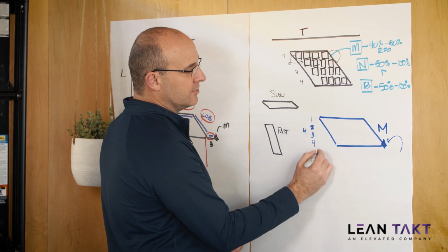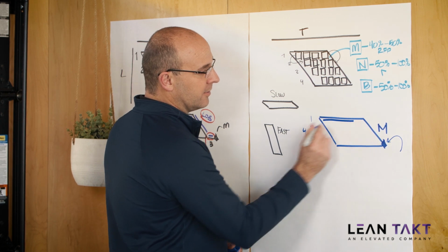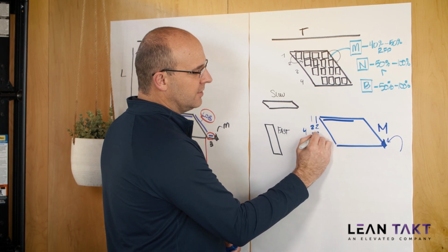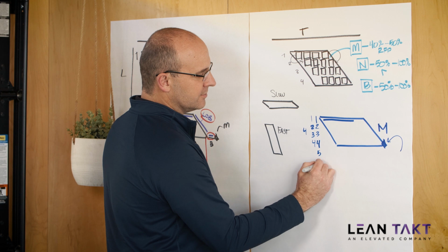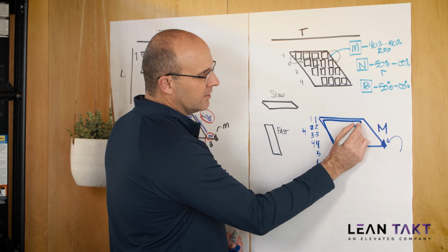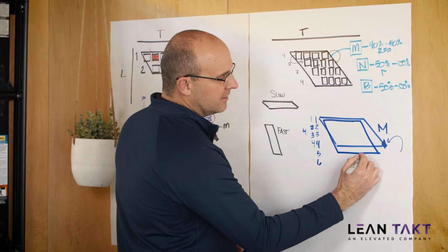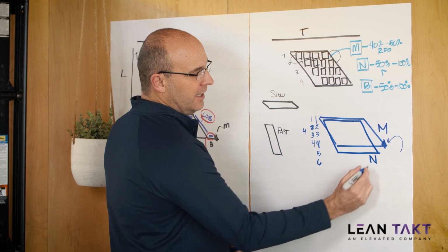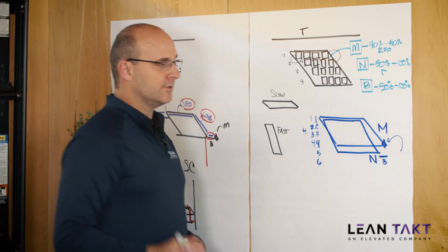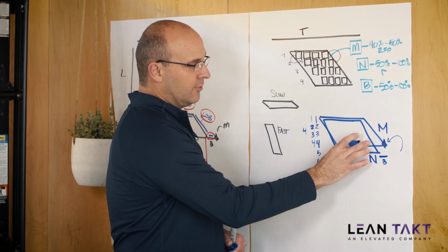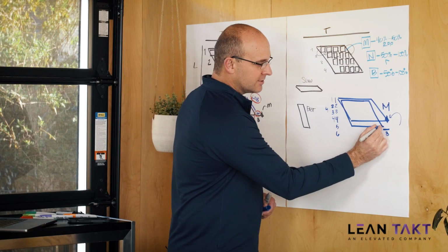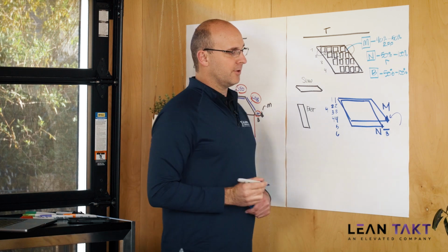So let's say that you do your pull plan now with your trade partners, meaning you verify the sequence, and you and your trade partners say, hey, I don't want to do 4 zones for the production schedule, I want to do 6. Then your takt plan phase would look something like this. This would become your norm, okay? What happens here at the end is really critical. This is where you get your buffer. So now you have a speed at your norm level where you're going faster, and you've gained buffers between when you're actually going to finish and the milestone that you promised the owner.